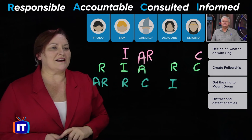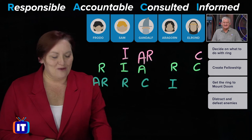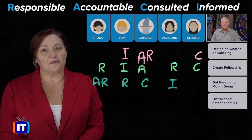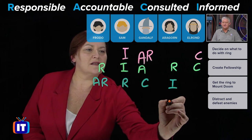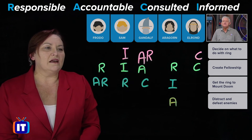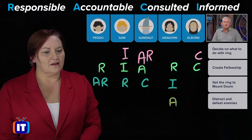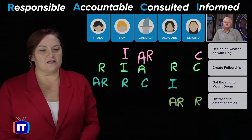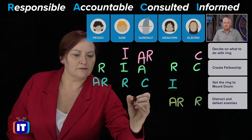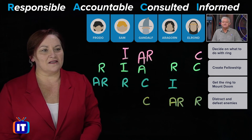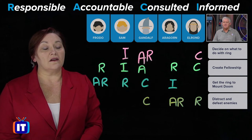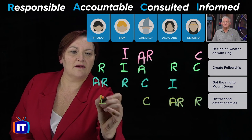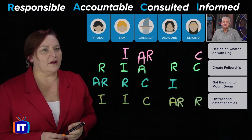Now we're on to distracting and defeating enemies. Who makes sure that enemies are distracted and defeated? Accountable would be Aragorn — he's the person that actually leads the charge. Responsible is also Aragorn, and Elrond as well. Is anybody consulted? That would be Gandalf the White at that point. Informed would be Frodo and Sam — they're not in the big battle, but they need to know what's going on.